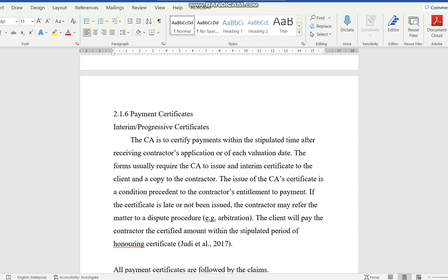Sometimes some contractors are scared because the client has a very bad reputation, so they ask for a payment bond. But very rare, but it does happen. Only CIDB contract covers a payment bond. Okay, so payment bond is that the client will keep money there, in the bank. It can be in the form of banker's guarantee as well for the contractor in case the client cannot pay. Then there is a payment bond that is available. So this bond, retention sum, this is all about sum of money that you retain in case one party did not perform and you have something to fall back onto.